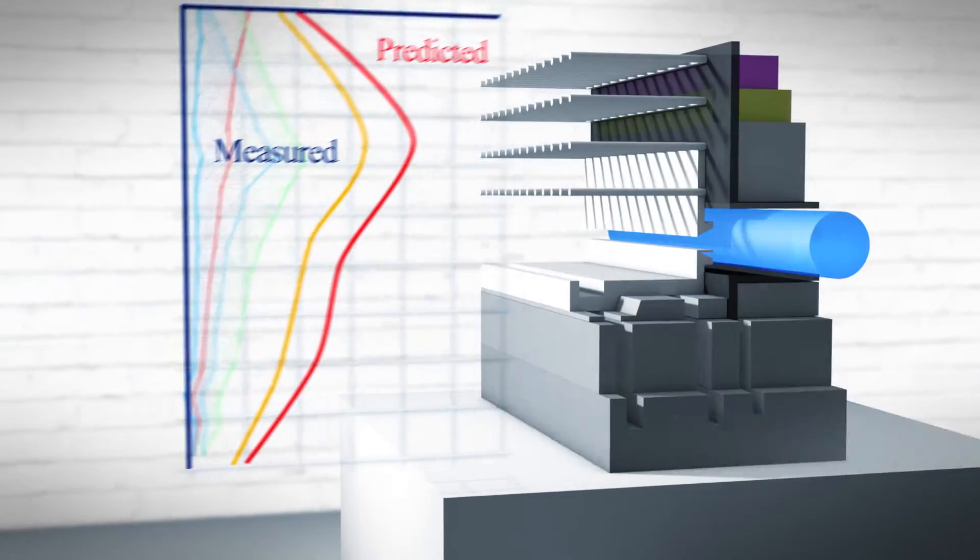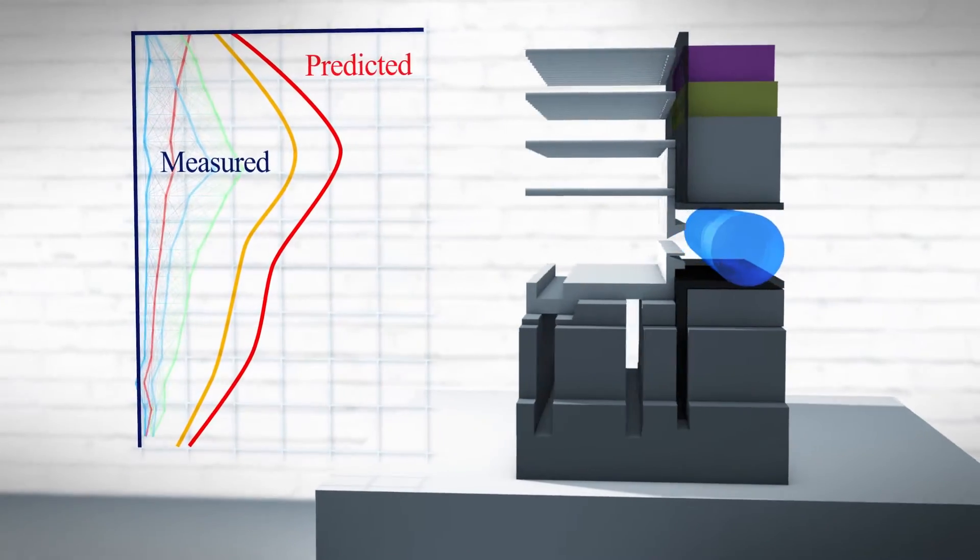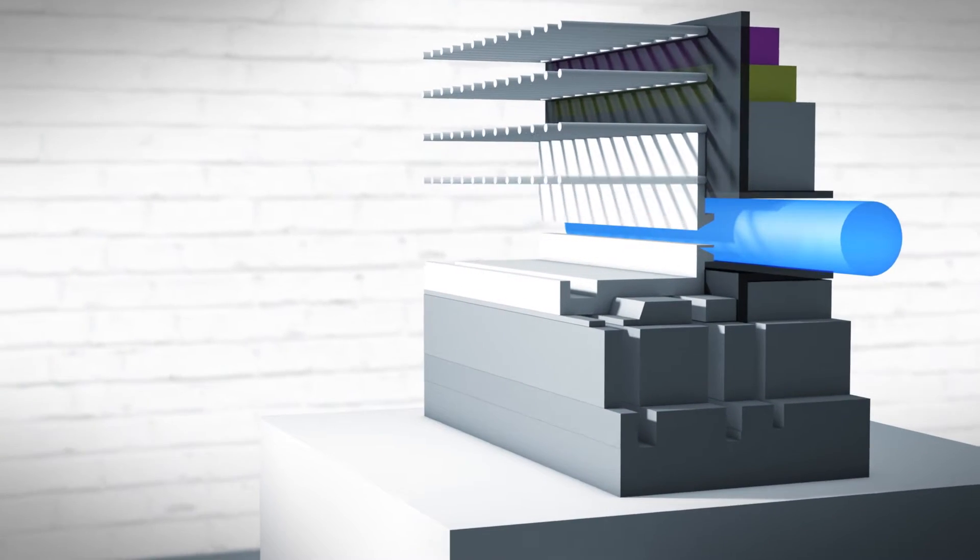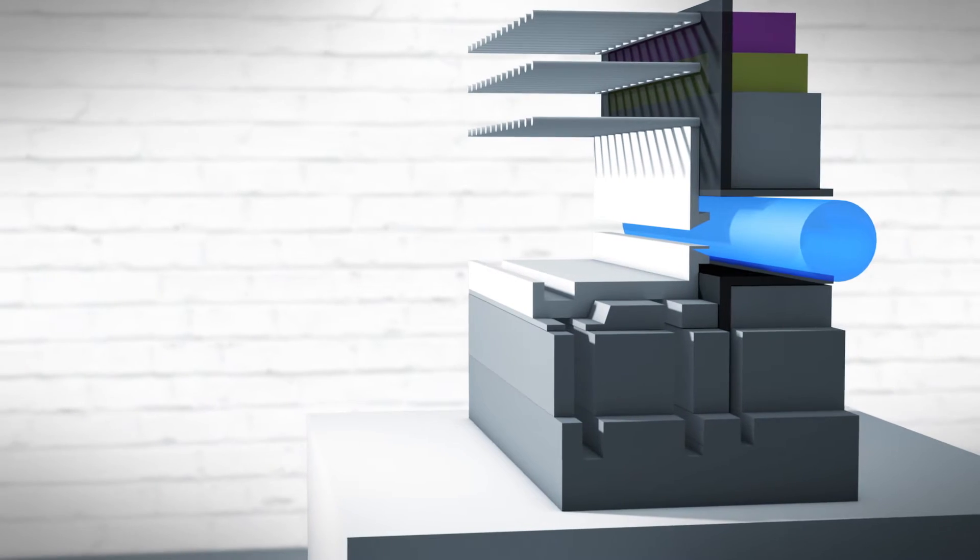The movements were only about half of those that we predicted, and we took the opportunity to back-analyze these movements. If they were smaller, what that meant in terms of stiffer and stronger ground, and to change the construction sequence and omit the final level.